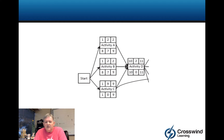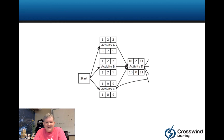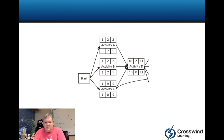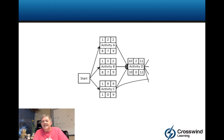The top right corner of any box is the early finish date of the activity. So for activities A, B, and C respectively, the earliest they could finish is day two, day two, and day nine. That's because the middle top number is the duration. A is two days long, so the earliest it can finish is day two. B is two days long, so the earliest it can finish is day two. C is nine days long, so the earliest it can finish is day nine.